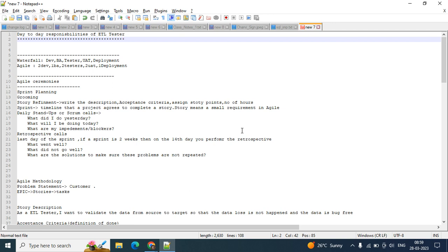And who will do this assignment? The Scrum Master. During meetings he will ask, if there are two testers, who will be working on this. You say so-and-so person, then he will tag that person. If you are working, he'll say, okay, I'm tagging you to this. Every time you are tagged you get an email, and there are comments also.